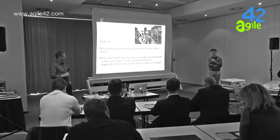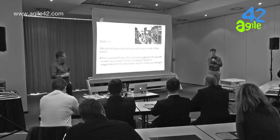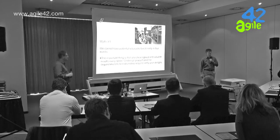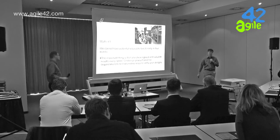So in terms of value produced, in terms of knowledge, at the beginning of a project, you are challenging a lot of assumptions, you are evaluating a lot of options, and you have a lot of sprint goals which are about stabilizing technology, evaluating performance, and stuff like that. And it's not just theory. You see people taking cables, going there, plugging in stuff, writing some fast tests for the system to load it and check how it's reacting to some specific load. Okay? So it is possible in both examples we presented, but in many others too. When I started developing car engine control equipment, we were also doing a lot of simulation using MATLAB, and we had a lot of sprint goals which were about simulating the interference and disturbance load of certain parts of the circuit, and we could already do that.